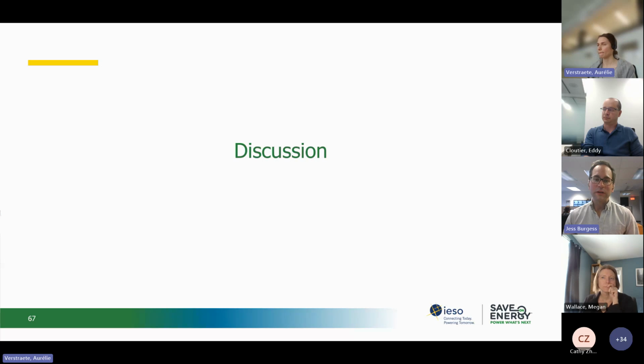Yep, and for the reporting document that you just mentioned, thanks, Jody, for chiming in on the chat. The EBCx program from Save on Energy does have a template for commissioning providers to use, and there's an email address there. You can contact the program to obtain that. And then, as Eddie said earlier in the first half of the discussion, when it came to the checklists, the CSA Z5001-20 standard has a lot of those checklists when it comes to functional testing, and the link for that is also shared above in the chat.